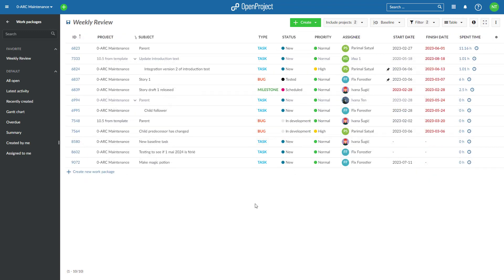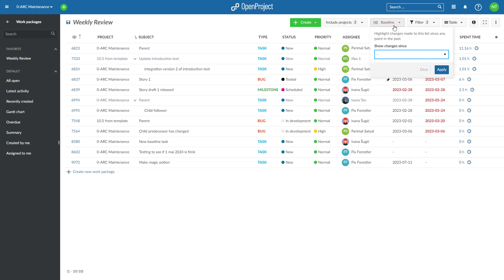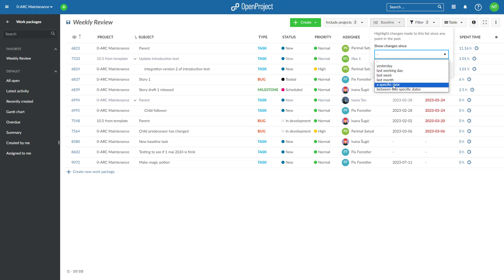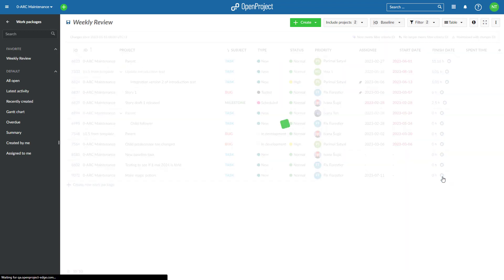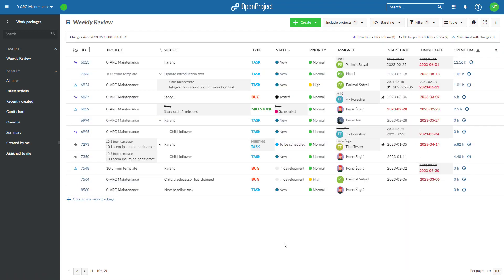Baseline comparison can be enabled on any work package table view. Click on the Baseline button on top of the work package table. Pick a comparison time by selecting one of the preset options or by entering specific dates and times. Click Apply to enable Baseline.